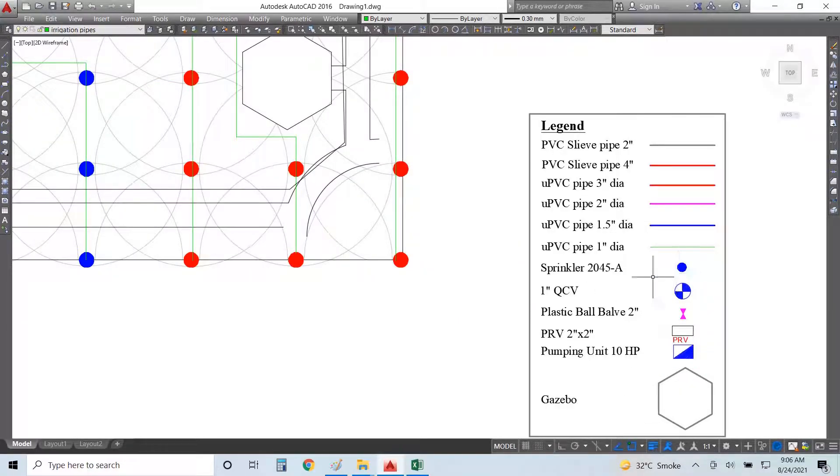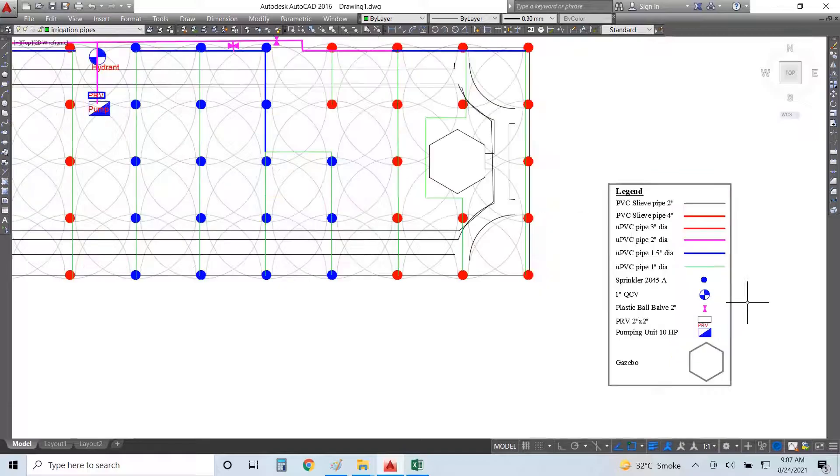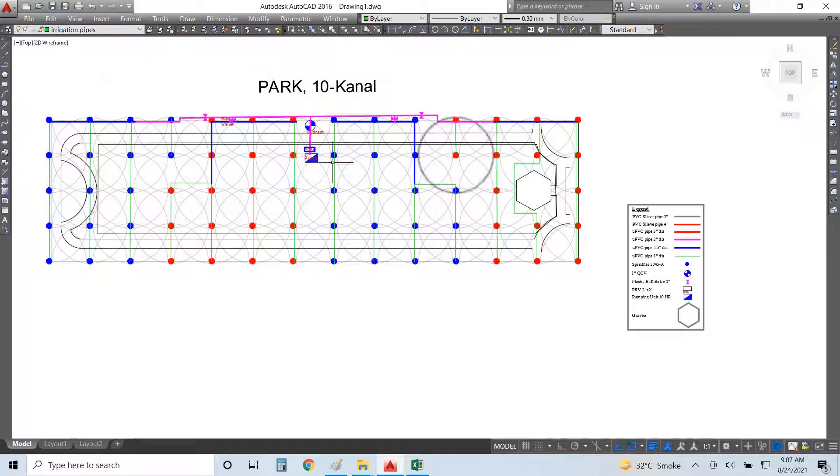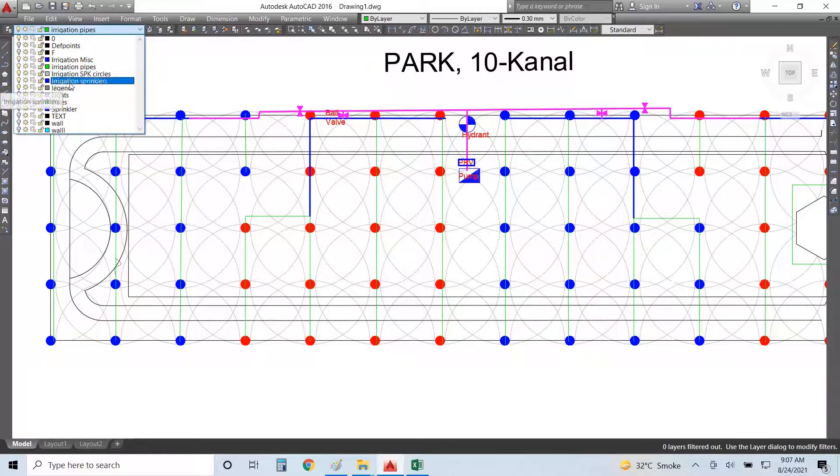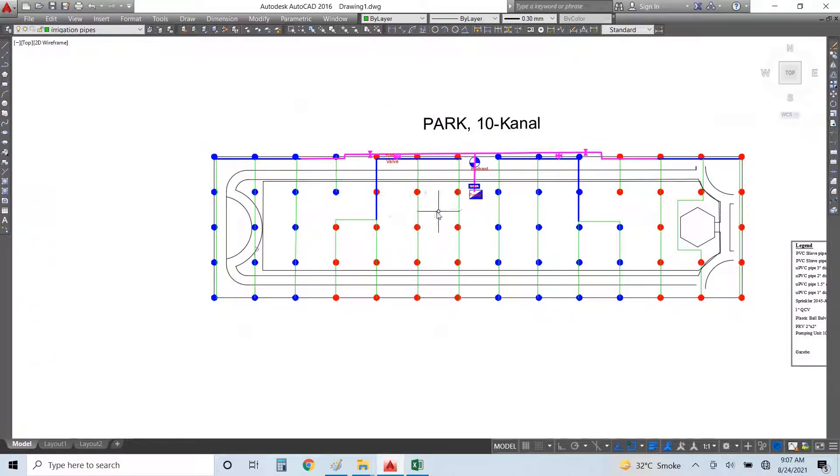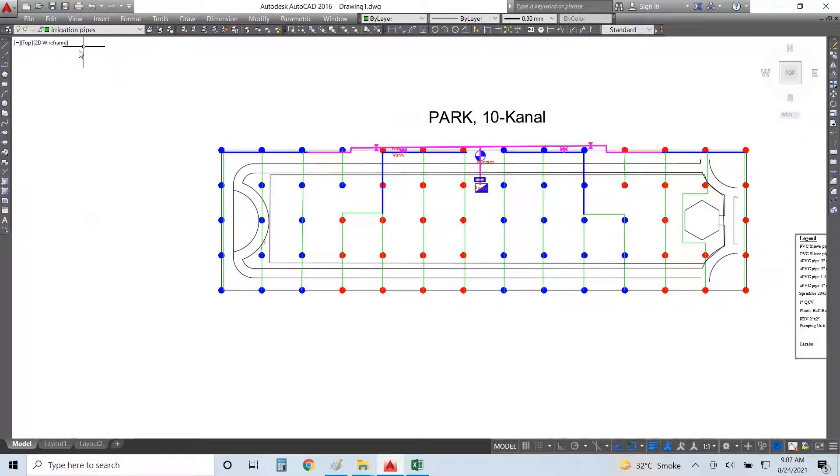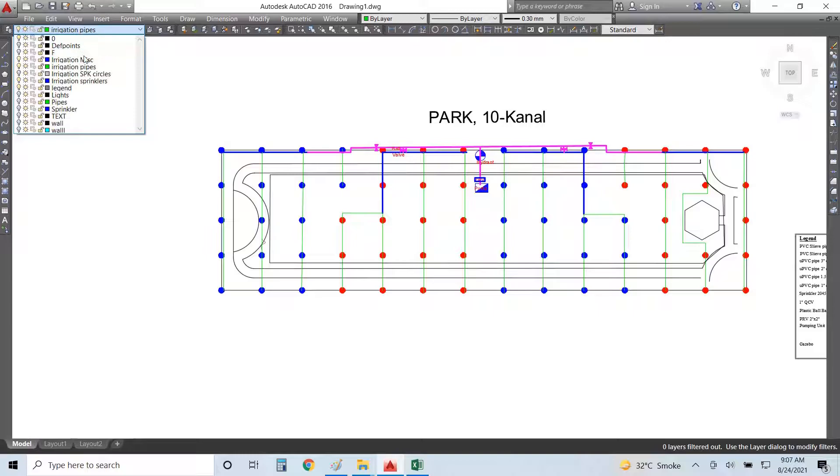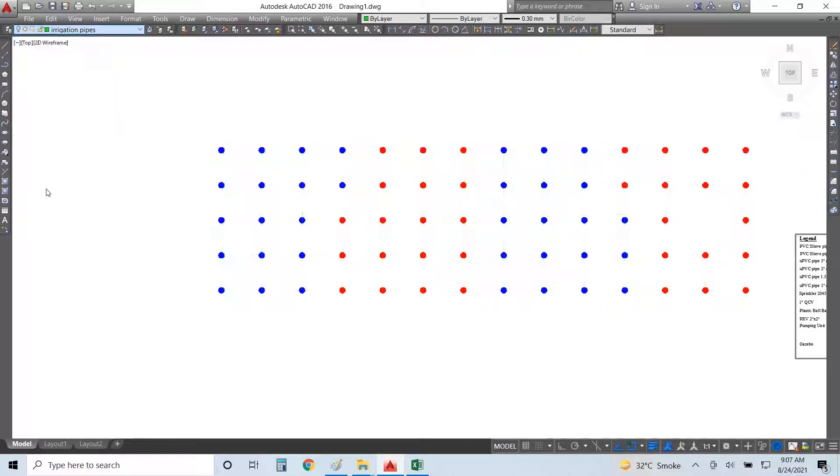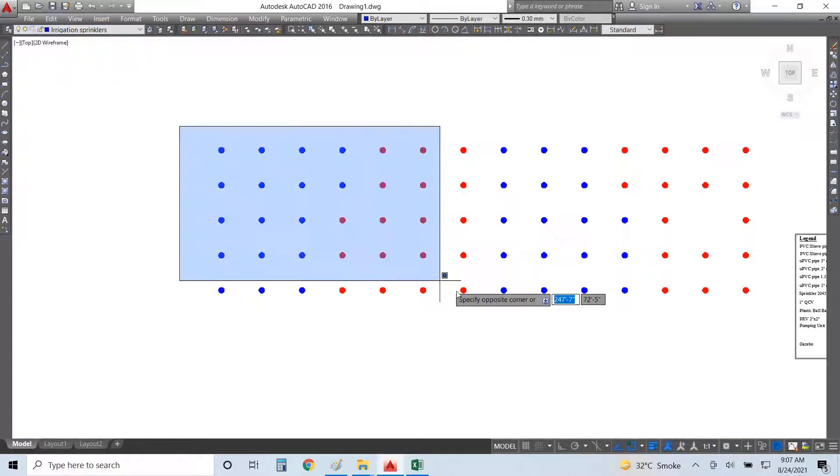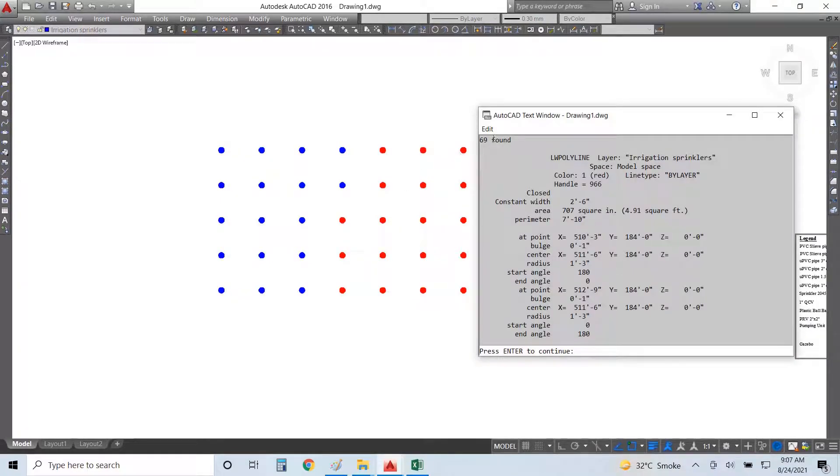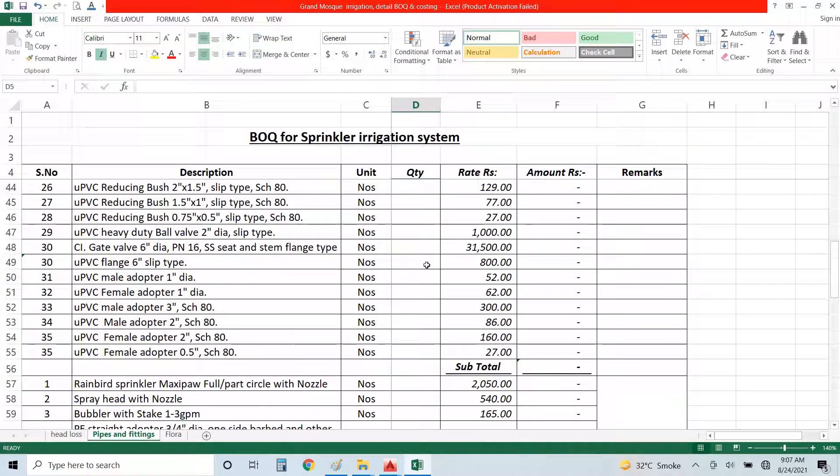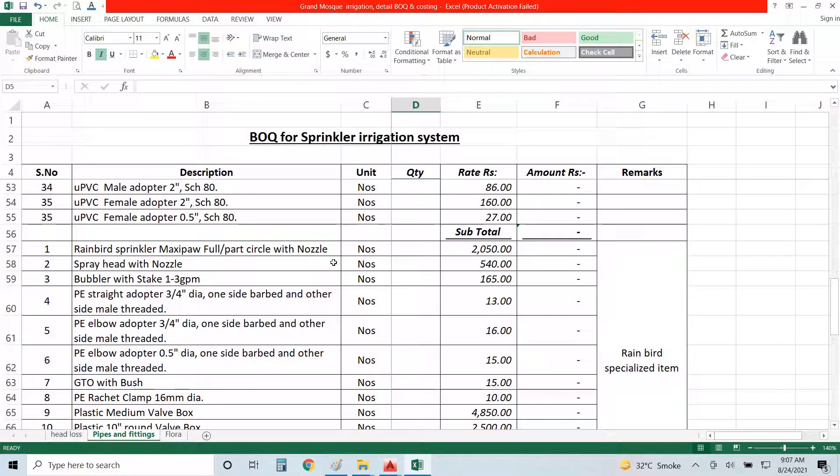As conduit we have the sprinkler notation, quick coupler valve, ball valve or flow control valve, pressure release valve, pumping unit, and gazebo notation. Here is the complete design. Let me turn off the circle layer. First of all to calculate BOQ you will turn off the layers and we have only left the sprinkler layer. I will select all and go to list command and there you can see 69 sprinklers. So here in my BOQ type sheet where I have already pasted the prices, I have entered 69 sprinklers.